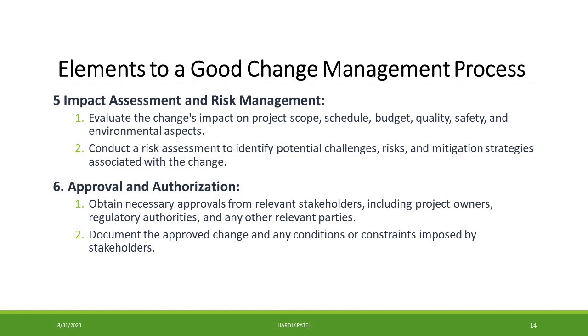It sums up to obtaining necessary approvals from relevant stakeholders, including project owners, regulatory authorities, and any other relevant parties. Document the approved change and any conditions or constraints imposed by stakeholders.